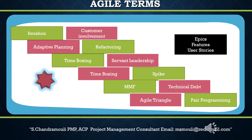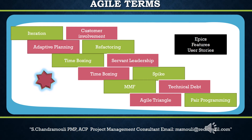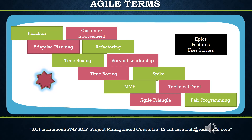A spike explores potential solutions for a difficult technical or design problem, which can be used to provide a more accurate estimate. If the team does not know whether a particular design approach will work out, it is recommended to do spikes to find out which design approach will work for the team. Spike solutions use controlled experiments to provide information.